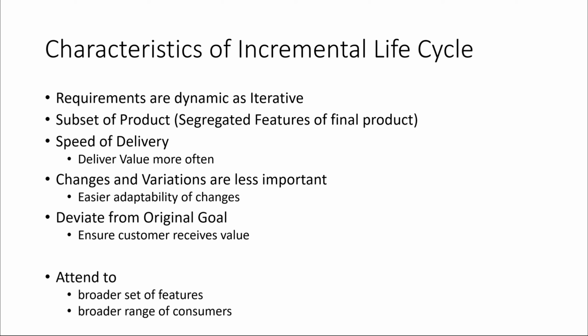In that case, they may complete a floor with fixtures, paint, and everything else intended for the finished floor before proceeding to the next floor. The customer is able to see and approve of the style, color, and other details, allowing adjustments to be made before further investment of time and money are made. This reduces potential rework and/or customer dissatisfaction.